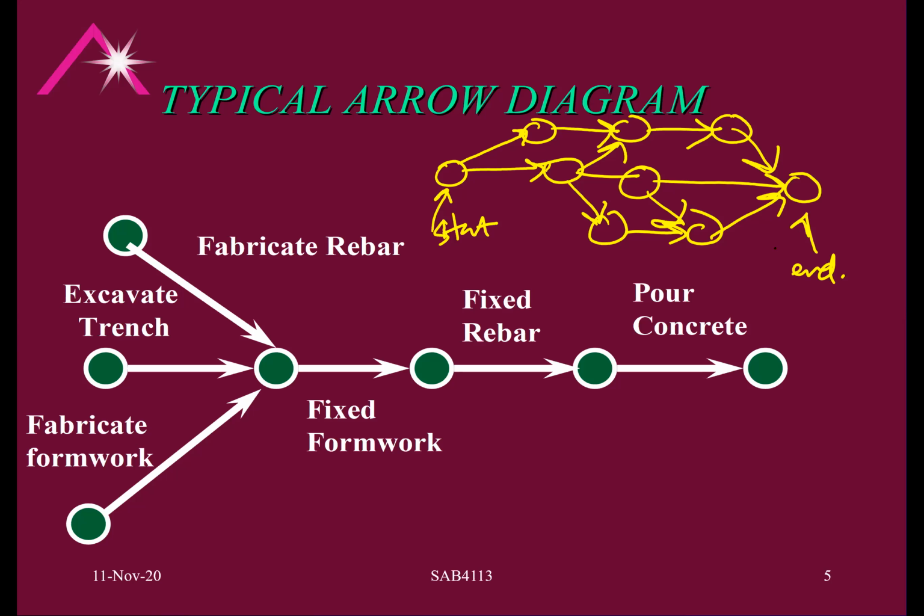Network diagram, as the name normally implies, it is like a spider web. You know, spider web is basically all interconnected. Okay, then only we call it a diagram. Otherwise, you do not basically get, at the end of the day, we are going to generate the so-called critical path. Critical path you simply cannot get when you have a node or activity which is not connected with something else. It must be connected like a closed loop.